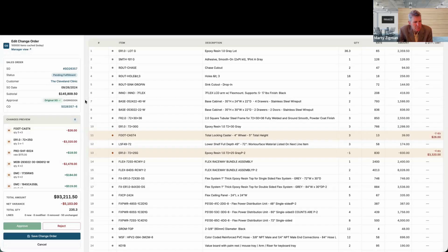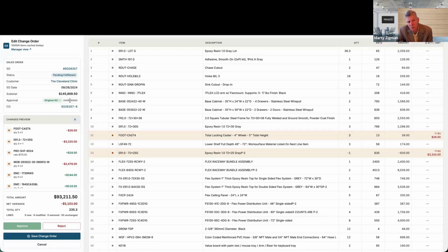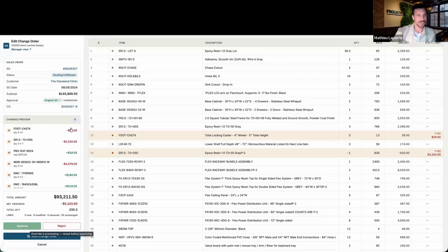What's happening behind the scenes is we have some flags that can be checked or unchecked, and this is really what's happening when you do this. So I'm just saying, okay, on this one I need to go outside of the norm, and that's what I just did. Notice it defaulted with the original rule, and now you just overrode the default rule. Correct. I cannot approve anymore because I have a different approval process when it goes outside the norm. Now you need to be a certain person to approve this. And I made it on purpose that I cannot approve it.